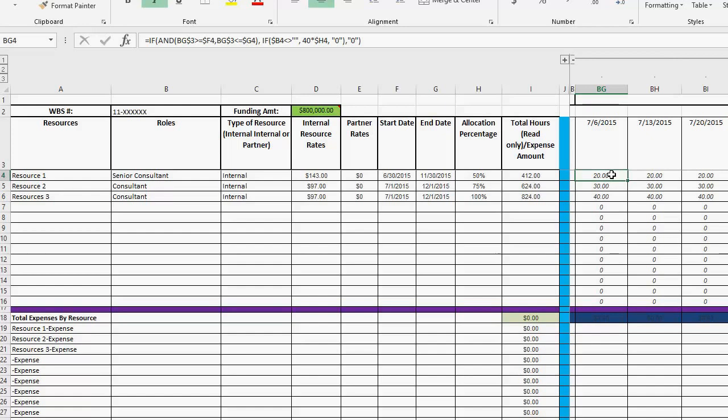And so based on that, let's go ahead and go into the formula and determine how this works. What I'm looking at is my start date, end date, my percentage allocation, and whether this field, which is called roles, is either null or has a value. If it's null, then a 0 value is returned. So the way this formula works is an if functionality.